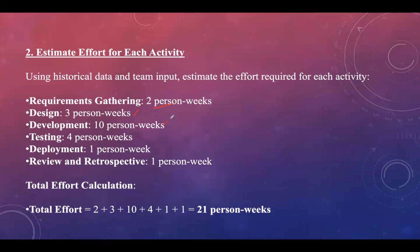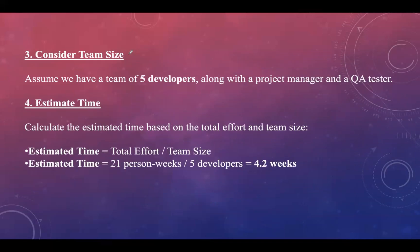Continuing the effort estimation: testing is 4 person-weeks, deployment is 1 person-week, and review and retrospective is 1 person-week. Adding all these values gives a total effort of 21 person-weeks, indicating a single person working full time for 21 weeks. With a team of 5 developers along with a project manager and QA tester, the estimated time is total effort divided by team size: 21 person-weeks divided by 5 equals 4.2 weeks.